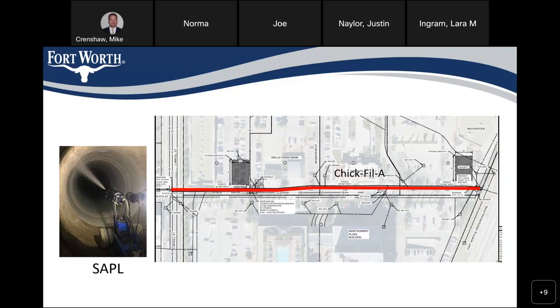We will be temporarily, of course, we need one lane to get into the manhole and work while the work's going on. Because it's trenchless, we don't necessarily anticipate having to close the lane. They will be temporarily down, so yes, that is unavoidable for that portion, during the times when we have to do that. The contractor will have traffic control plans and a whole set of details they'll have to follow to make that safe, but some of that will be just during the work is the goal.